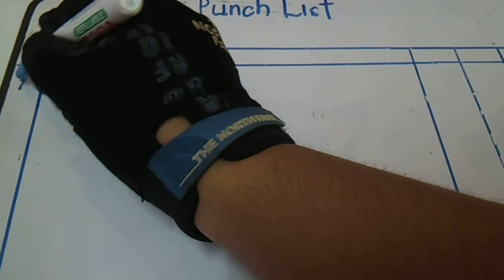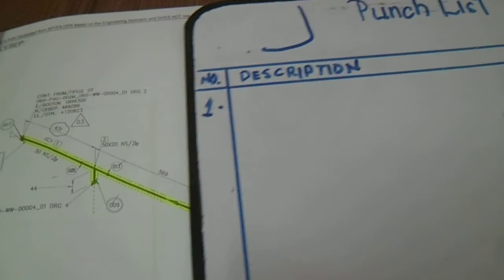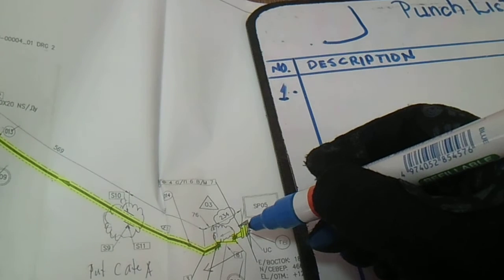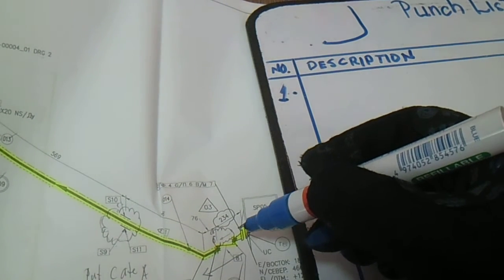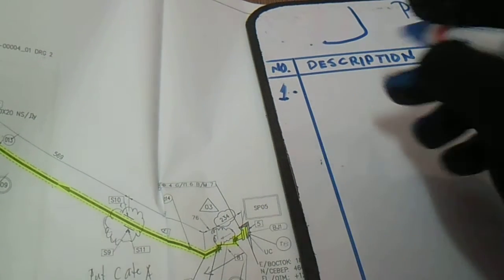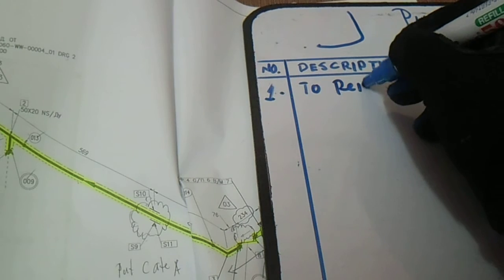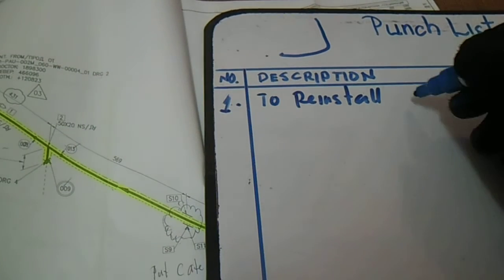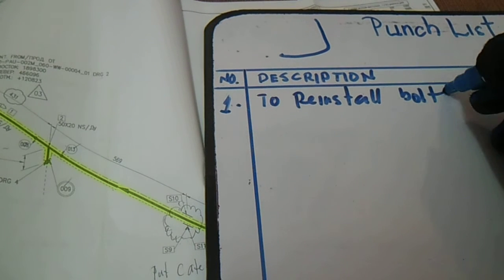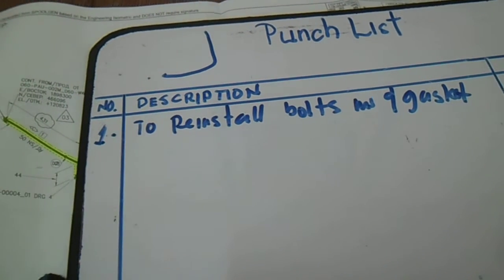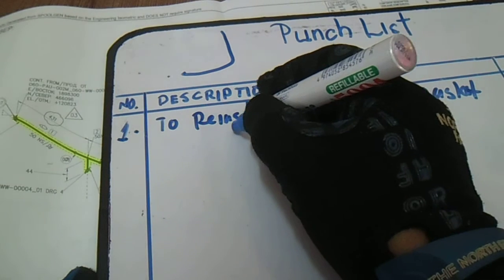From this punch list, number one: you have a comment on this isometric. Let's say you have a bolt here because we have a blind and also a weld, so the comment here is to reinstall bolts, nuts, and gasket after test or after commissioning.